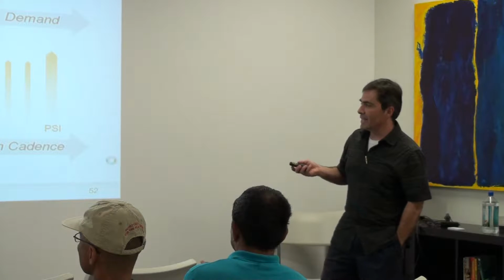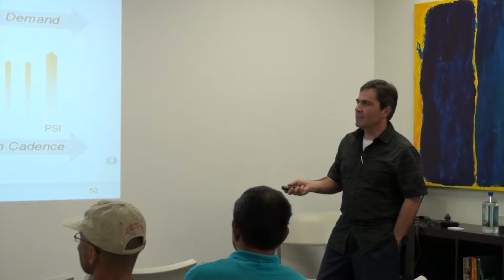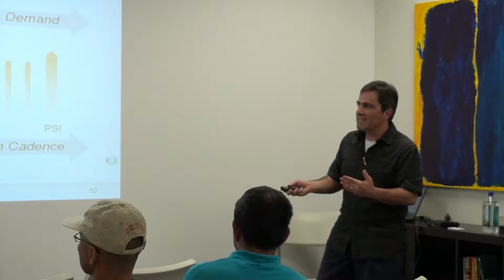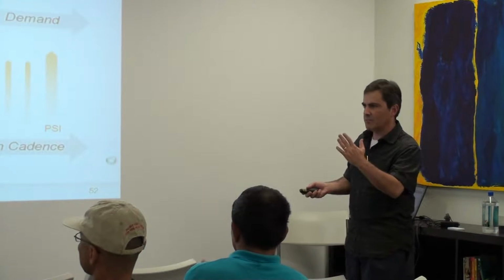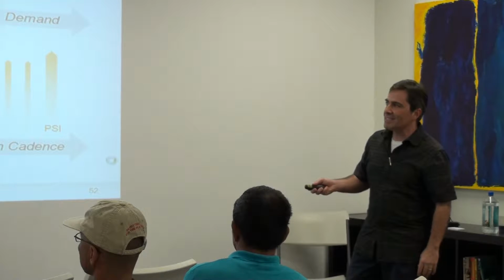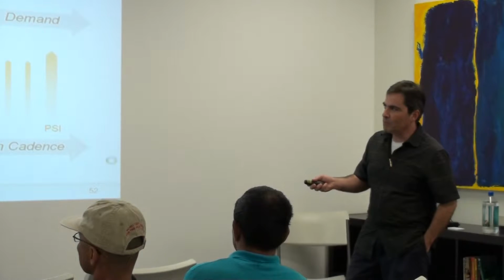So this slide is to kind of get that resolved. Is that the PSI, just like the sprint every 2 weeks, is a release every 10 weeks? We're going to release the big program level, potentially shippable increment. But it's an internal release. So if you look at this, the yellow, the big ones, are the program releases.